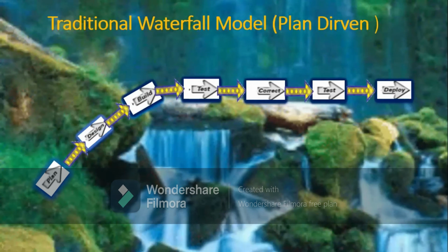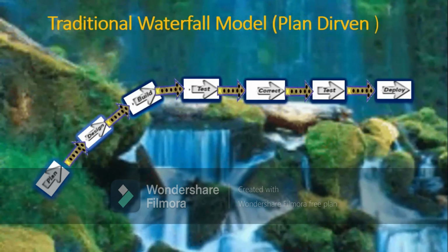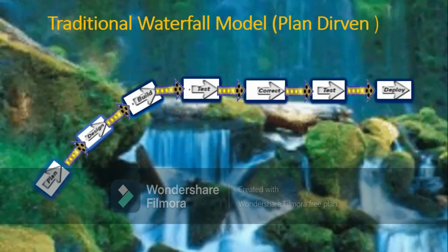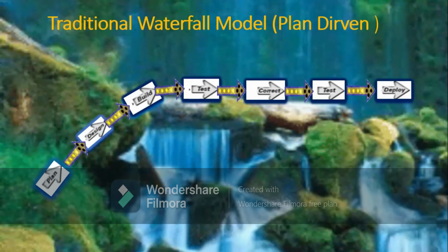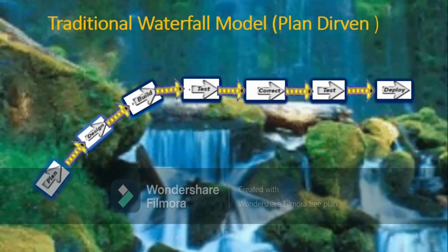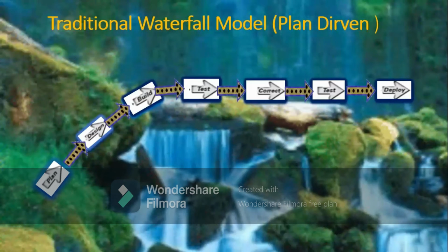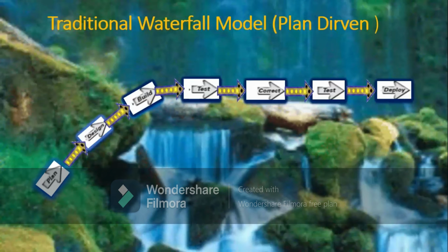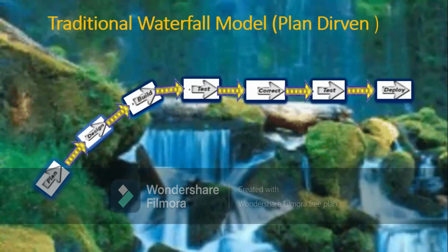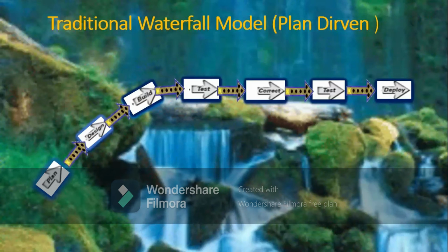So it's a long process. Again, it's not bad, but traditional waterfall, as I always say, works only for big projects, right? For long duration projects. Agile is perfect for small projects. If my customer is a type of changer, he keeps on changing, then Agile will be a perfect fit for him. If the customer does not know what the requirements are, then traditional waterfall will not be perfect. Agile will be better because you will start feature by feature by using FDD, feature driven, and then you will explain it to him and show it to him. So both of them are perfect.